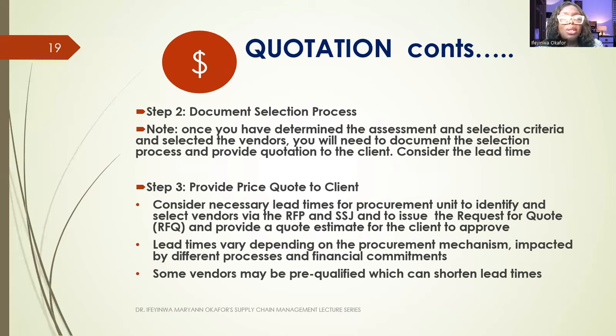Then quotation continues. Document the selection process. Note, once you have determined the assessment and selection criteria, and you have selected your vendor, you will need to document the selection process and provide quotation to the client. Once you have done the assessment, and you have done selection criteria based on landed cost, best value, and quality, and you have selected your vendor using these criteria, you will need to document the selection process and then provide quotation to the client.